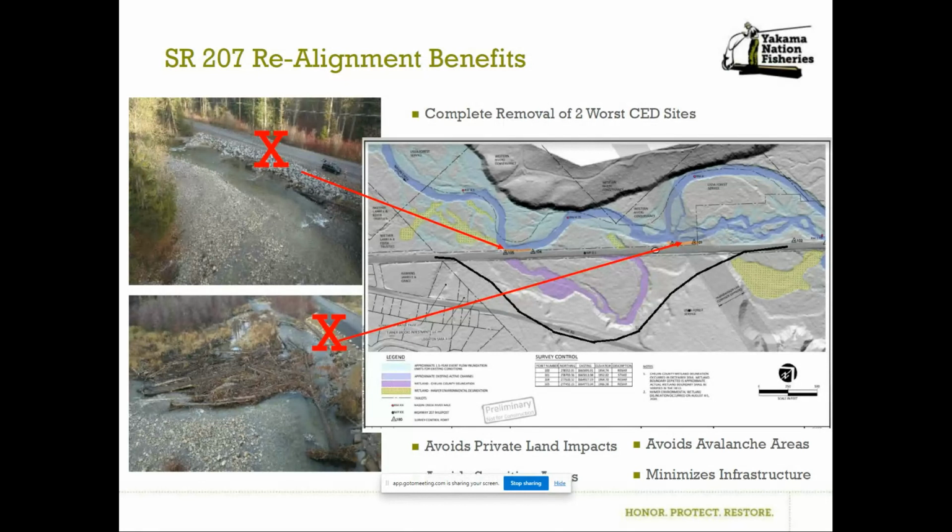John, okay. I'd also add that this is the breakdown of the phase 1, phase 2 concept. Phase 1 is dealing with the road and the road infrastructure in the floodplain. Phase 2, which we're not seeking funding for through this process right now, but our intention is to build it right on the heels of phase 1, is more of the in-stream habitat restoration components.